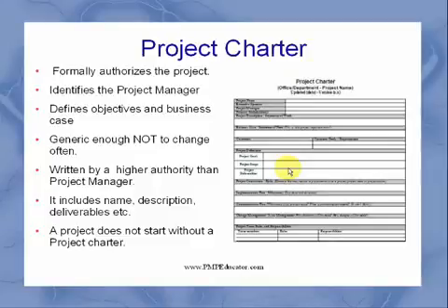So the project charter usually doesn't change often, though your project management plan changes often during the project management life cycle. It is written by a higher authority than the project manager, usually senior level management people. It includes name, description, and deliverables, etc., for all the work that needs to be done.